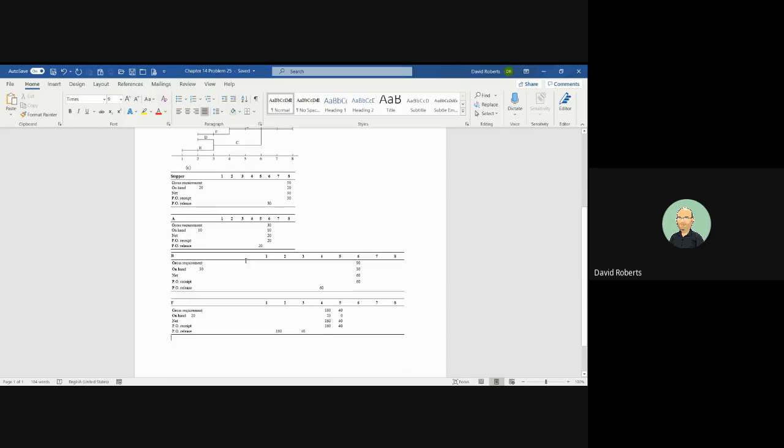So you take the stepper master production schedule, which is related with the aggregate plan. So for the gross requirements, you need 50 steppers in week 8. You have 20 on hand. So if you don't place an order, which is how I've always viewed the net requirements, you're going to have a shortfall or negative inventory of 30.